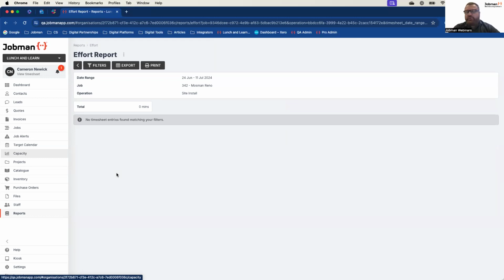If you look through 10 or 12 jobs and you start seeing a repeated pattern, therein now lies the advantage of the system for you to be able to go, okay, the issue is not that we're not quoting enough, because the majority of our team are handling their operations in the expected times. It's that we have a staff member or staff persons that perhaps need some training or some improvement of productivity. We need to have a chat to them and offer them some ability to help them step up to the rest of the team. Now, obviously, in a lot of cases, that may be the apprentice.